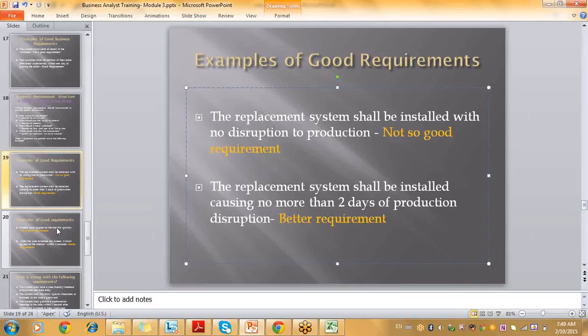I don't know. Yeah, but they will tell you correctly from their perspective. That, okay, we'll need this requirement to be developed, and we will develop this requirement in 2 days. So what we as a project manager, if you are a project manager, would say is, okay, you said 2 days, let me keep 1 day extra in case you can't finish it in 2 days, right? You don't know, right?